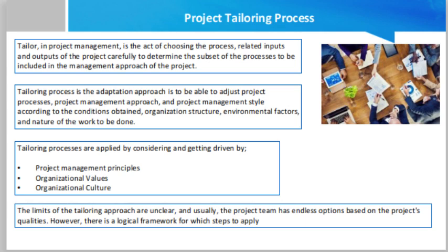This process is intended to aid the project management team in planning, controlling, and governing the use of the project and deliverables appropriately so that the project team can work in the project deployment. Examples of tailoring that are common in project management include the addition and removal of tasks and work products, changing milestones and their state of completion, responsibilities for review and approval, and detailed procedures for performing measurements and managing the requirements. Once the process tailoring is completed, deployment usually follows.